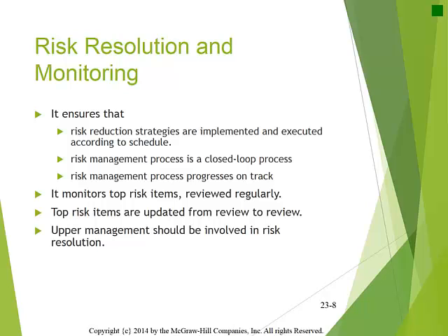Risk resolution is carrying out the activities to reduce risk specified in the risk management plan. Risk monitoring validates the risk reduction strategies per the plan. Not all of the risks should be reviewed, only the high priority risk and the ones that would cause the most damage if they occurred.